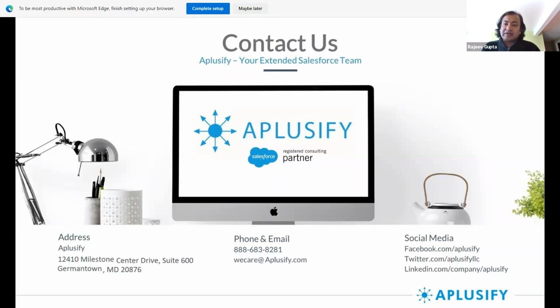So let's say if an organization is using a membership product, then the best time is right after you have sent the renewal notices and your maximum renewal activity has happened. This is a good time to upgrade because you may not see such a rush for the next couple of months. If you're using the events product and you have a conference coming up, there's no need to touch the system at that point. It can wait a few months, it cannot wait a few years, but there's always a way to find a slower time for the upgrade during the year, and it has to be aligned with the business priority.